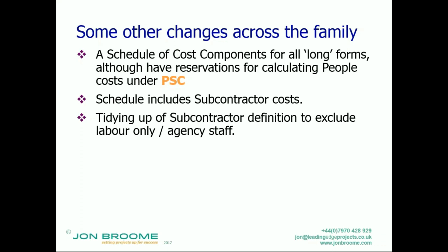Basically, are labour only agency staff subcontractors? Well, if you looked at the old definition of subcontractor, they are, but in that schedule of cost components, in the box at the top of the page, they were considered as a people cost. So which one are they? It caused confusion and argument.